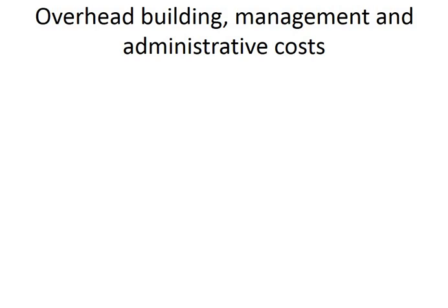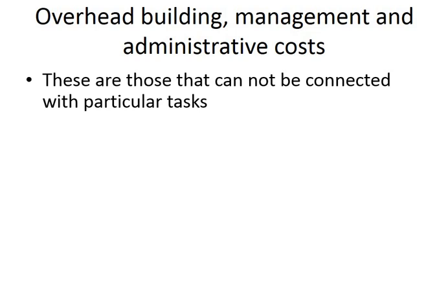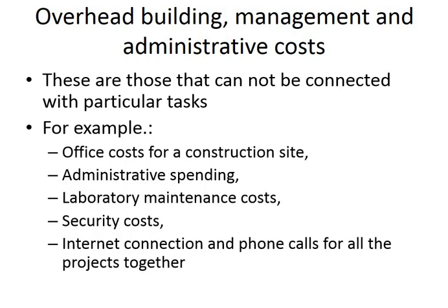This is the cost for the total project, and you cannot divide it between different tasks. So there are costs like that, and there are other costs like laboratory maintenance costs in the case of an R&D project, security costs often in different kinds of projects, and so on and so on.